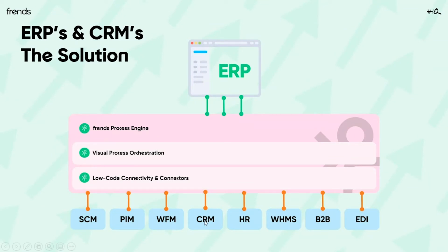You can create those against your old system, or just between the existing systems if you're onboarding a completely new system. But if we first create the needed integrations, this gives us knowledge and understanding through the integration platform on what we actually need physically, technologically, and logically from the ERP vendor in order to make that transition or rollout project as smooth as possible.